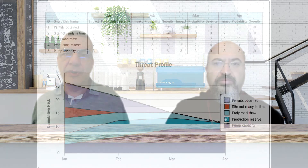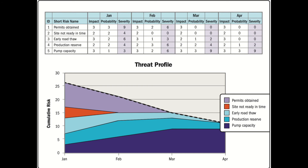A response to a specific threat might include multiple strategies. For example, if a threat cannot be avoided, it may be mitigated to a level at which it becomes viable to transfer or accept it. The goal of implementing threat responses is to reduce the amount of negative risks. Risks that are accepted are sometimes reduced simply by the passage of time or because the risk event does not occur.